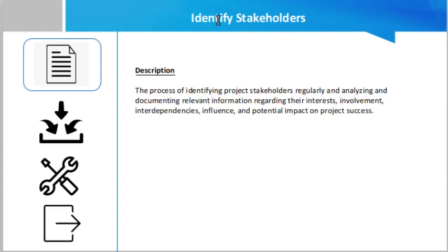Why is it important? Because, being a project manager, if you miss any stakeholder at the time of initiation of a project, that stakeholder will definitely be identified at some later stage, and when he or she is identified as a stakeholder in the project, he will definitely come with some change requests, some modifications in the scope, or maybe he will not accept the requirements, or he needs some modifications in the scope document.